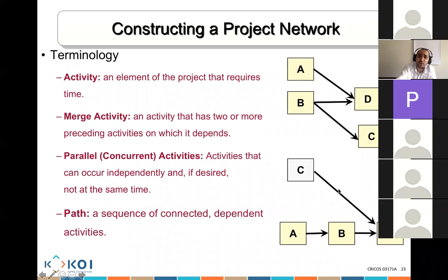When you know how every activity is connected, you'll know which ones can be delayed and which cannot. The ones that cannot be delayed are what we call the critical activities that we need to manage. The ones that we can delay are called non-critical and have a slack that we can delay accordingly.